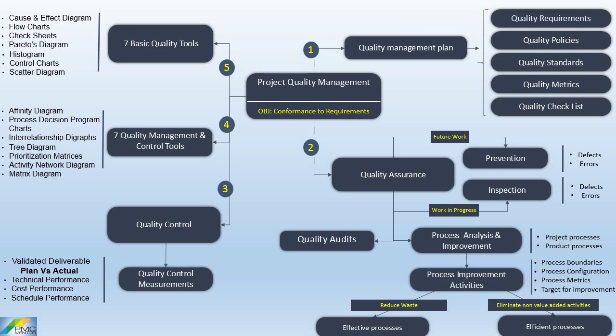The sixth basic quality tool is the control chart, which is a graphical display of process data over time and against control limits to identify when a process is out of control. Scatter diagram is a correlation chart that uses a regression line to explain or predict how the change in an independent variable will change a dependent variable, or if there is a relationship between two variables.